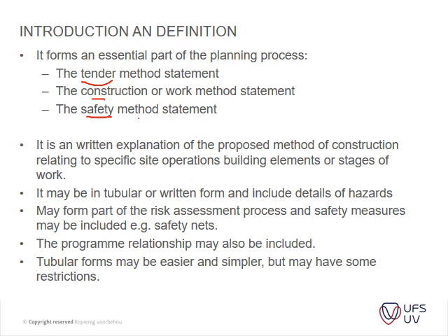Your scheduling, your program is also a method of capturing the method of execution. So usually that runs hand in hand. Your program and your method statements complement each other. It may form part of a risk assessment process and safety measures, and it may be included like safety nets and so on that you need to think of when working at heights. The program relation may also be included.